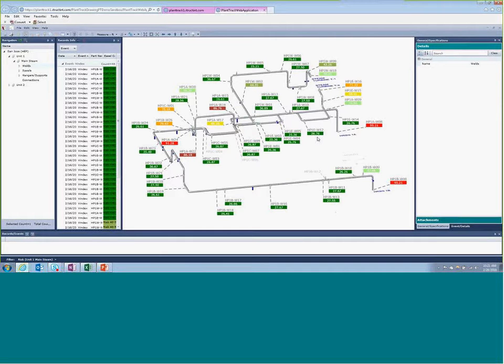Okay, so now you can see here, again, score from 0 to 100, 0 being low risk, 100 being high risk, and the colors are posted in line with that, red being high risk, orange being pretty high risk, and so on and so forth. So now you can see from a global perspective where your areas of high risk are. So if you go through and build a scope of work, now you can sit here and say, okay, I know I have limited dollars for this upcoming incentive. I know that I have a limited outage window, so I can, me personally, work with the engineer and start to develop a scope of work that fits within their budget while still capturing areas of high risk.